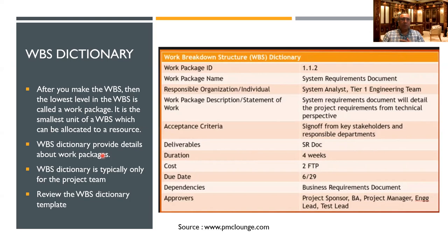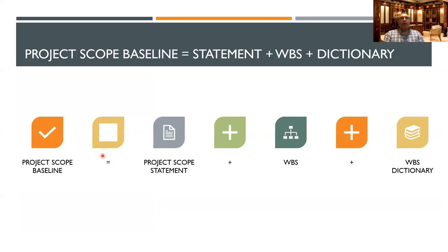Those are the next 2-3 weeks we will be talking about in more detail. But once you have that information, you will put it into the WBS dictionary and provide that to the person or the team who's going to do the work. Okay. And so we said the baseline. Baseline is the standard or the reference, something you look at again and again, you refer to. That is called a baseline. There's a scope baseline, and later on we'll talk about the cost baseline.